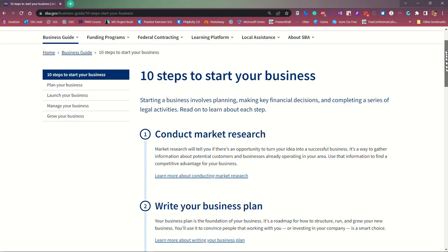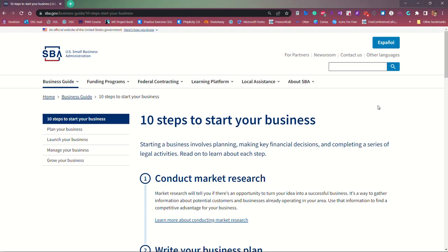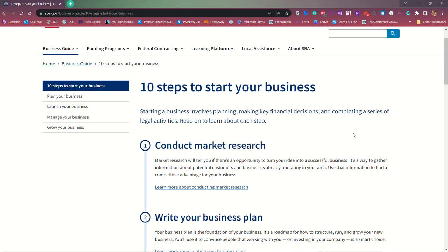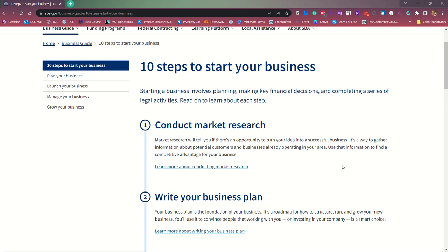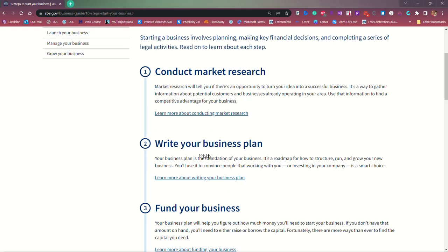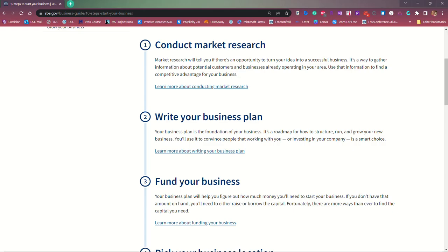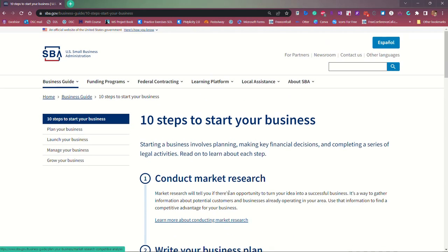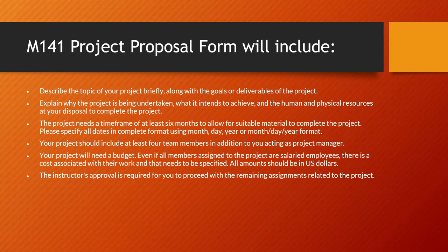So you don't want your topic to be start a business, because it's just too much, especially for this project in this class. What you could do is say, I want to do starting a business, but I want to do just the conducting the market research part of starting the business, and that will be acceptable for your topic. Or you can say, writing your business plan and funding the business. You could put those two together, but we don't want to go so wide as starting your own business, because that involves a lot, and there are many smaller projects in that.